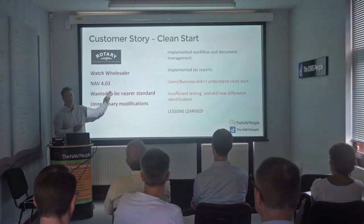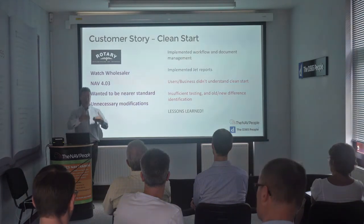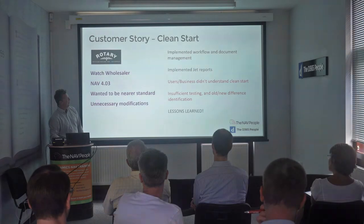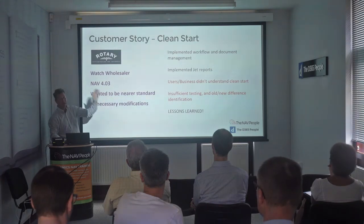So that's a very important lesson. If you're using the word upgrade, at least make sure you're telling them it's a clean start upgrade and therefore you get exactly what you're seeing in the test system, and they need to be aware of that. And in reality, as you can imagine, we ended up having to go back and make it much more non-standard, because there were lots of things the users belatedly said, yeah, we need this, we need this, we need this.